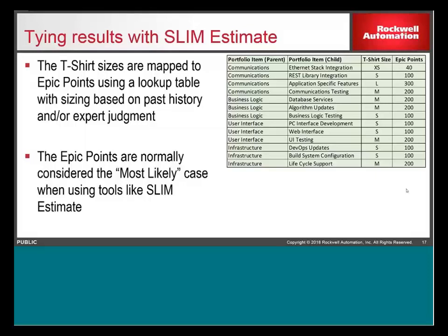How do you size at the end of the project to collect historical data? I haven't, since my main project hasn't finished yet, it's been going for the past 5 years. What I've been doing is, during the different program increments, I have been capturing some of the metrics data as we've been progressing. And I started to map that basically from a PI to PI.